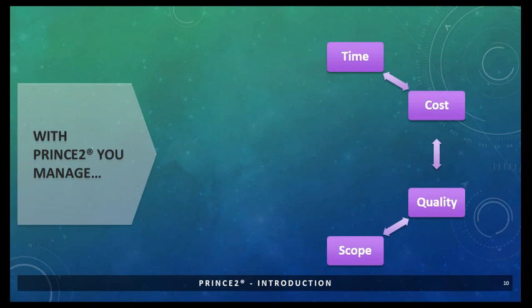Scope. Scope is all about doing the right stuff. Your project scope is defined in probably a project statement where you write down the deliverables, the assumptions, the constraints that you have in delivering the project. So scope is a breakdown of precisely what you're going to deliver in a project, and you as a PM, you need to define the scope very clearly at the beginning of the project and ensure no new work is done without checking the impact on the other project constraints like time, cost, or risk.